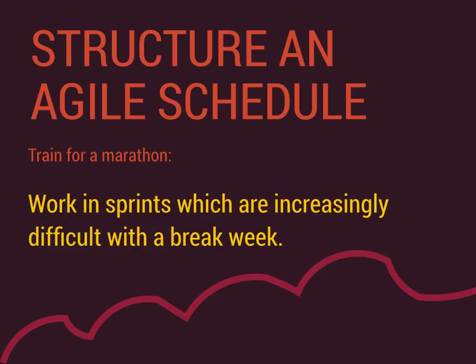we deleted what we had originally created in terms of those print-friendly style sheets. But I sliced it down into how can we expose that epic into chunks that don't seem that difficult. Print-friendly style sheets, totally straightforward to build. A page that is what they're going to see in their printer, totally straightforward. Okay, no, they really do need to trade PDFs. We knew that all the way along. The client and I did. But we gradually built up to it, we planned to replace, we exposed the functionality, we proved that it was going to be useful, and then we finally threw out the original piece.